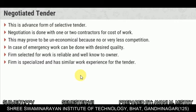Negotiated tender — this is advanced from the selective tender. Negotiation is done with one or two contractors for the cost of work, and this may prove to be uneconomical because there is very little competition. In case of emergency, work can be done with the desired quality, and the firm selected is reliable and well known. The firm is specialized and has similar work experience.